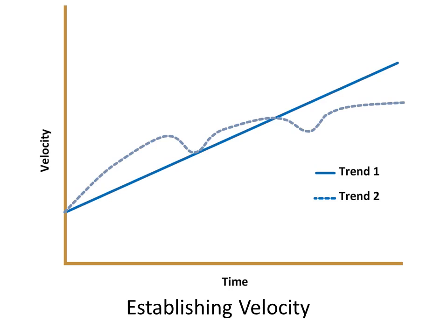So generally there would be a certain gain from the first sprint to the subsequent one, but finally the team will reach a steady state, and that's basically the velocity for the project. And if you don't change any major factor in it, that velocity can be used as a tool to compute the likely timeline when all the identified features or the release can be done.